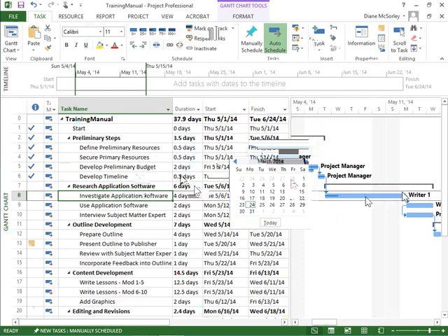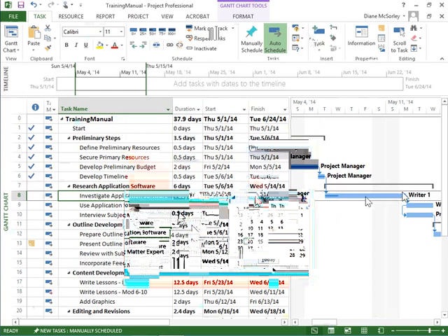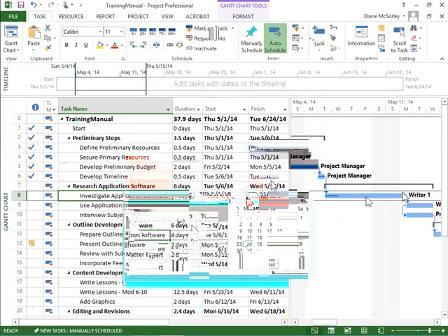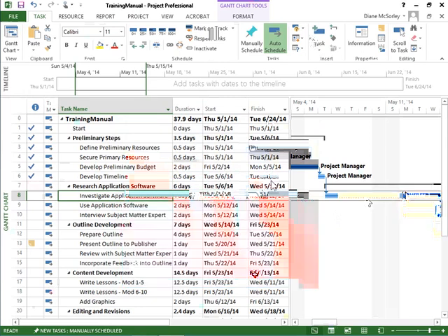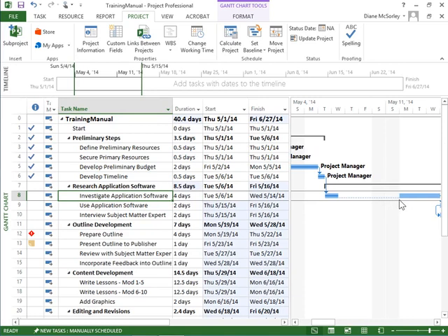All right, let's take a look before I click anything else. My projected finish date right now is June 24th. Here's my task. There's the Gantt bar. I click OK. There is my big split. And you can see it did push the finish date out. It pushed the finish date out, but the duration has stayed 4 days. It's 4 days of work over a longer time period.